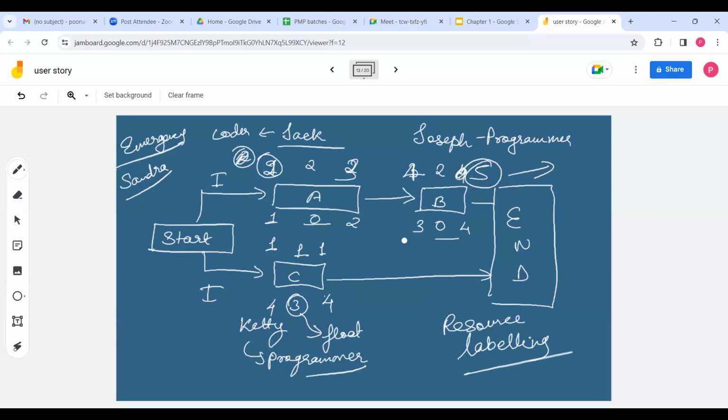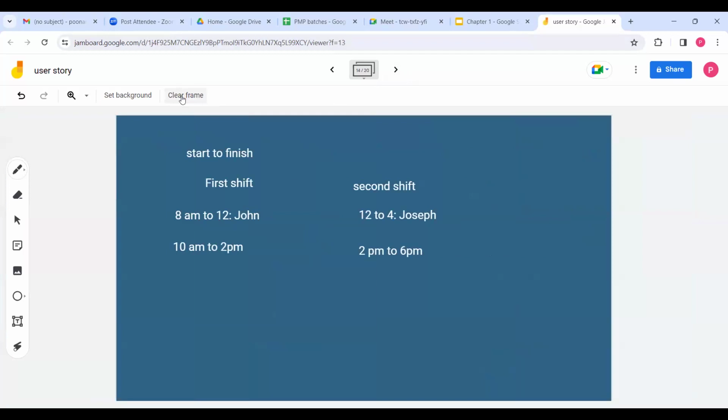And can you do it on your own? No. Because once Jack has gone for emergency leave and Sandra comes, and you have to deviate your critical path and have to adjust the end date, you have to go to the CCB.